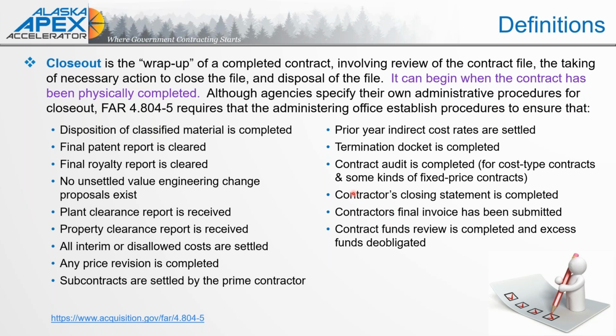You want to make sure that each option year you have that paperwork complete. Because if you're looking at doing all of this after the completion of a 5-year contract, it might be harder to find all those necessary documents to ensure that you have a complete contract file and all of the data needed to prove the performance, so that when you are settling up that final invoice, you don't want to have to go back and search for anything that you might need as supporting document.